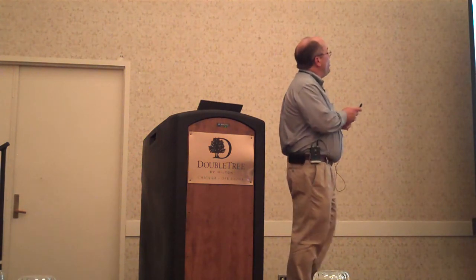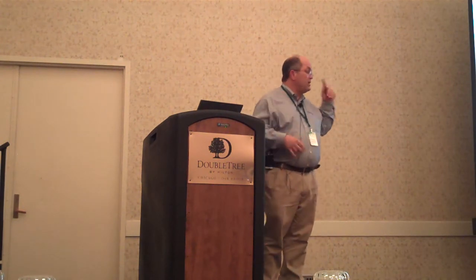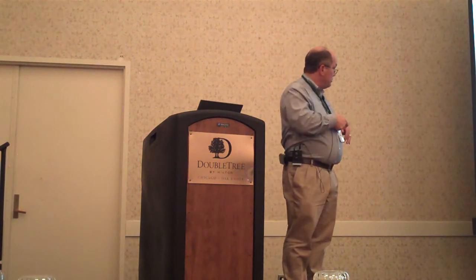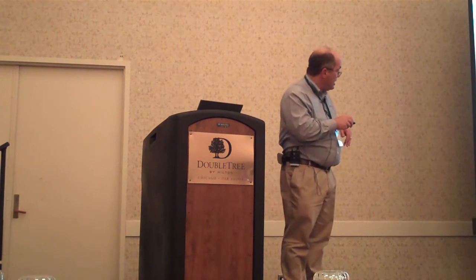So once we installed Project Server, what we did is we developed a solution that looked like the card wall for these guys, and we put it up on this big screen at the end of the table. So now the team, you're going to see that they're actually paying attention to their burn down. They have their burn down chart up there. They also have their card wall up there that they can actually manage. And so the status of the project was live, full-time, all there.